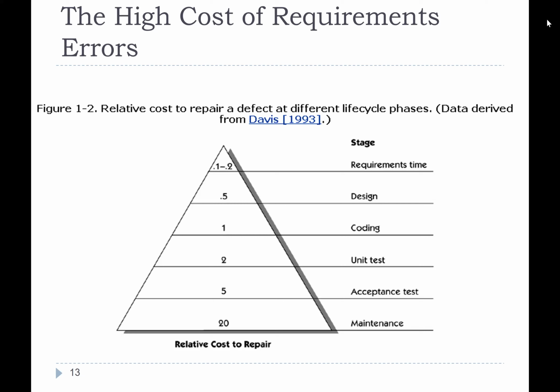Because there are two phases. While it's still in-house and we're developing it, you're supposed to develop something that is error-free, all right? Before it goes to the site and becomes operational, there is something called acceptance. We do acceptance testing with the customer, in other words, for the customer to accept the software. Once they sign it, halas, the development project is finished and the maintenance contract kicks in. Be sure to get that maintenance contract, because that's where most of the money is. You can spend 6 months on development and 5 years on maintenance. So make sure you do get that maintenance contract.